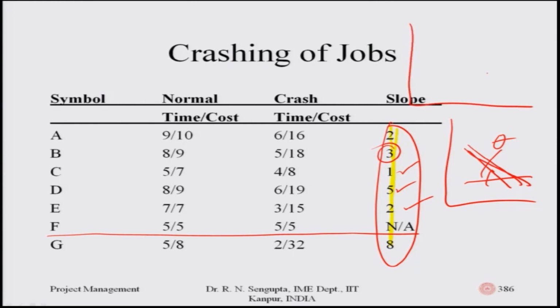The cost factor is like this. I use a step function such that this portion, marked by A and B, has to be replaced by a straight line. This straight line is basically a tangent, and this slope would replace that part of the curve. Similarly, I have another tangent from B to C, which would replace the portion of the curve between B and C.